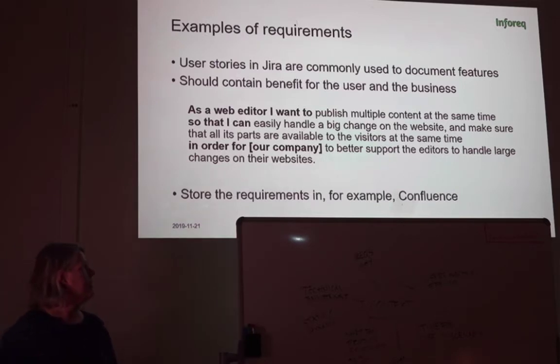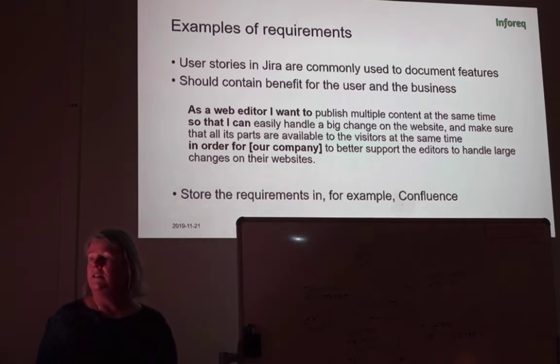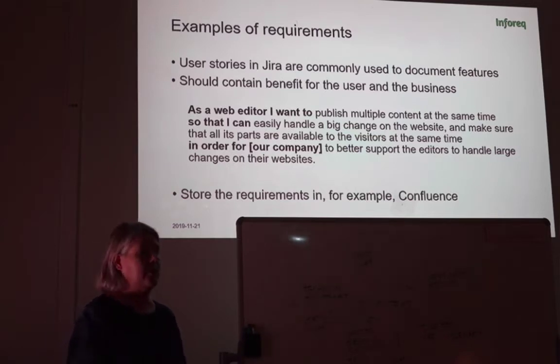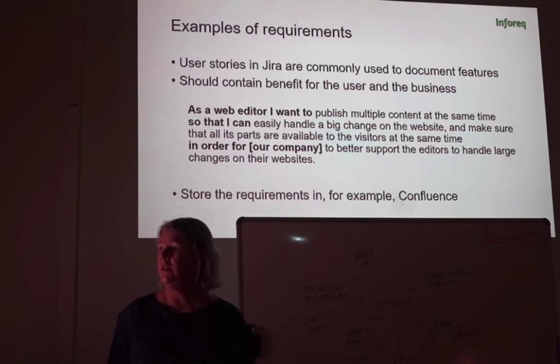And I think I've also seen that some put their requirements in Jira. I think you should keep the user stories and the requirements separated, because you can actually reuse requirements at a later stage if you want.